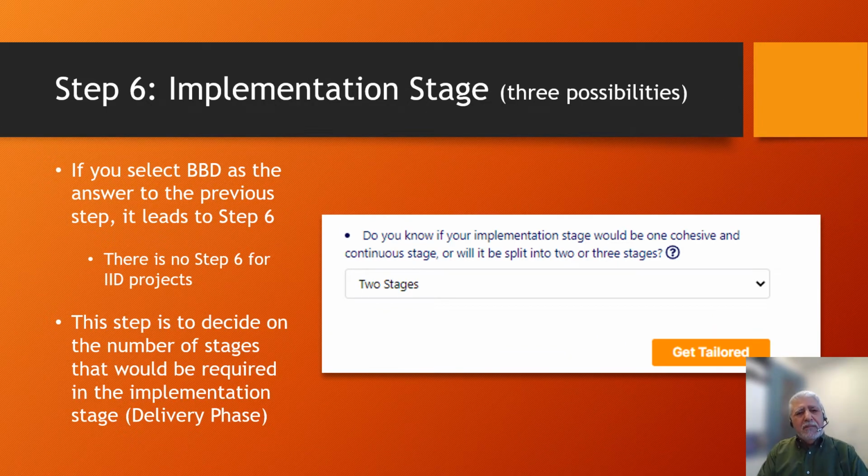So now let's say we decided on this type of project, maybe we are building a hospital. It's going to be a big bang development because we need to develop the hospital at the end to deliver to the client. Otherwise, the client cannot use the hospital until everything is finished, right? It could have many components, many sub-projects in it, but at the end of the day, the client cannot reach beneficial value. They cannot start to operate the hospital until it's fully completed. So it's a big bang.